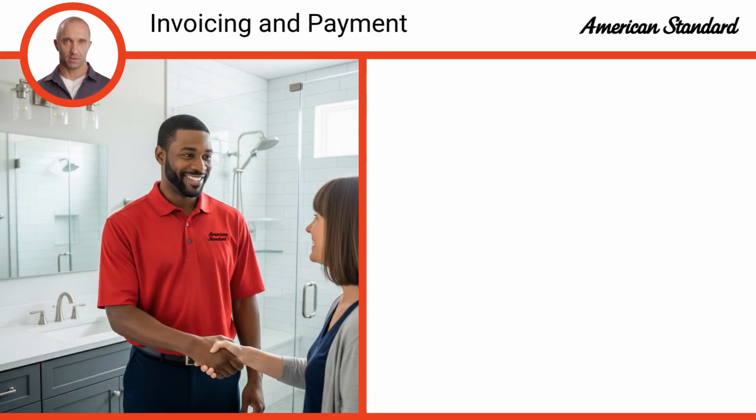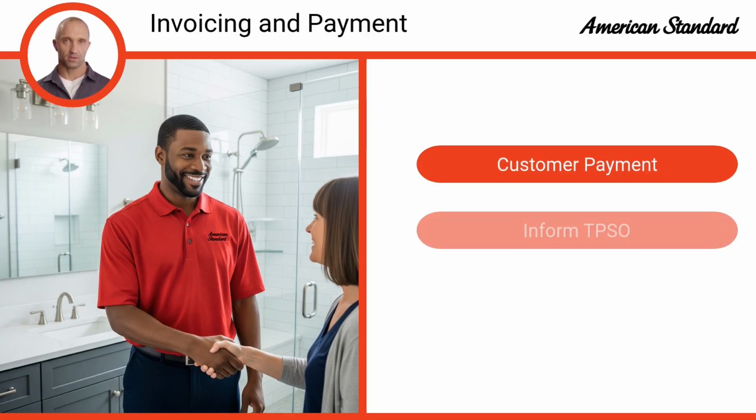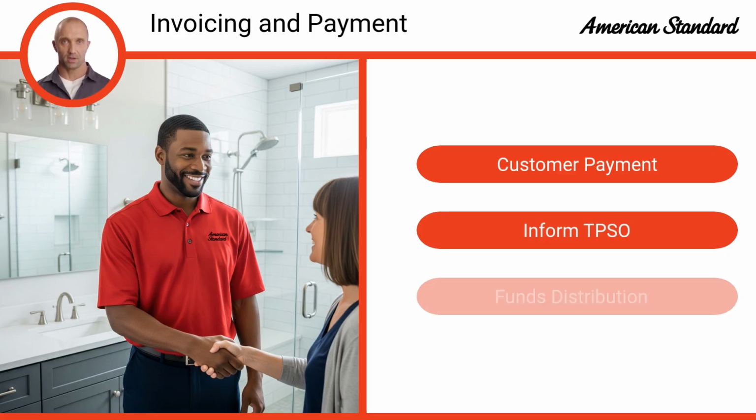Once the consumer pays the amount that was owed and the payment is processed, the funds will be distributed to the involved parties. This will vary if the MDP team or the general contractor ordered the product. Upon payment confirmation, the MDP team should be informed about the payment completion. At this point, the payments should be distributed to the proper parties, and once this is done, the work order should be marked as done.